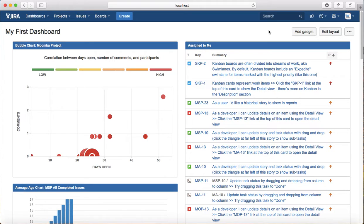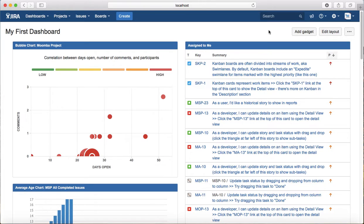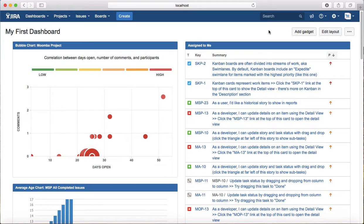...there will be a clear burn down chart report that comes out every day, which shows the progress of that particular sprint or issue, where that issue currently stands, how much time has been spent, and what remaining effort or time is needed to complete that issue.